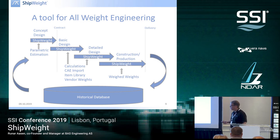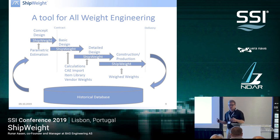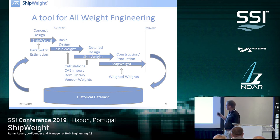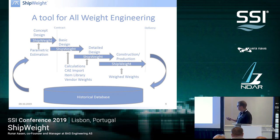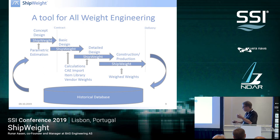After you enter the contract, you go into the monitoring phase — basic design, detail design. ShipWeight is now used as the main hub to gather all the most up-to-date current weight data coming from different sources: from vendors, from CAD systems, and things like that. You can also use ShipWeight in construction and production to gather as-built weights from weighing of lifting through grains of sections.